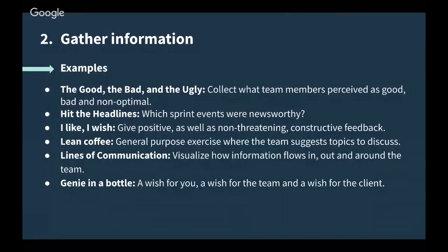Genie in a bottle, we used that with CRM a few weeks ago. Basically, you ask people to state a wish for themselves, for the team, and for the client, things that they would like to happen. This is also a great source of information to detect what makes people unhappy or what annoys them and what they want to change. And it's a great way to find the stuff to discuss and problems to solve later.